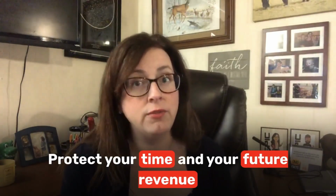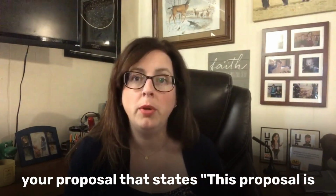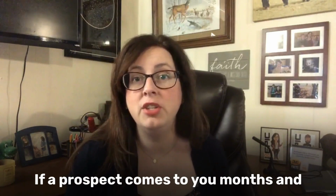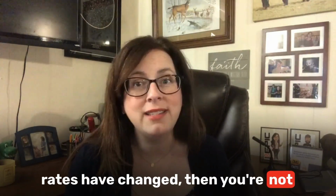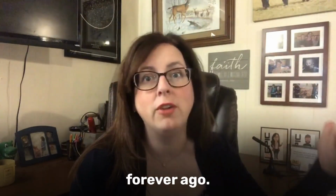Protect your time and your future revenue by placing a one-line disclaimer in your proposal that states, "This proposal is good for 30 days from receipt." If a prospect comes to you months and months after the initial proposal and your rates have changed, then you're not tied to the rate that you quoted hours and days and forever ago.